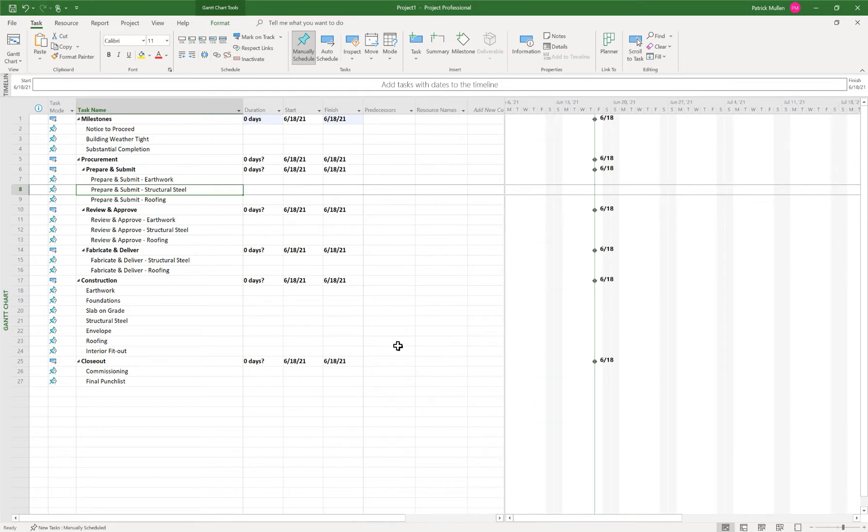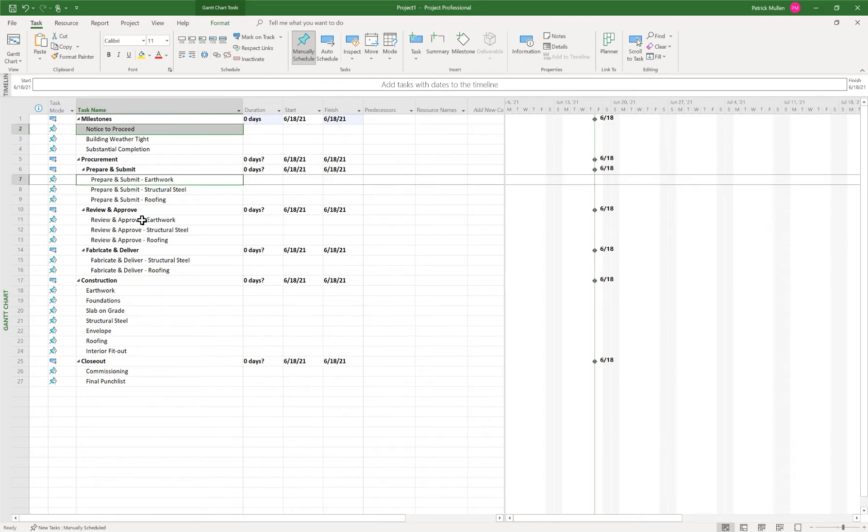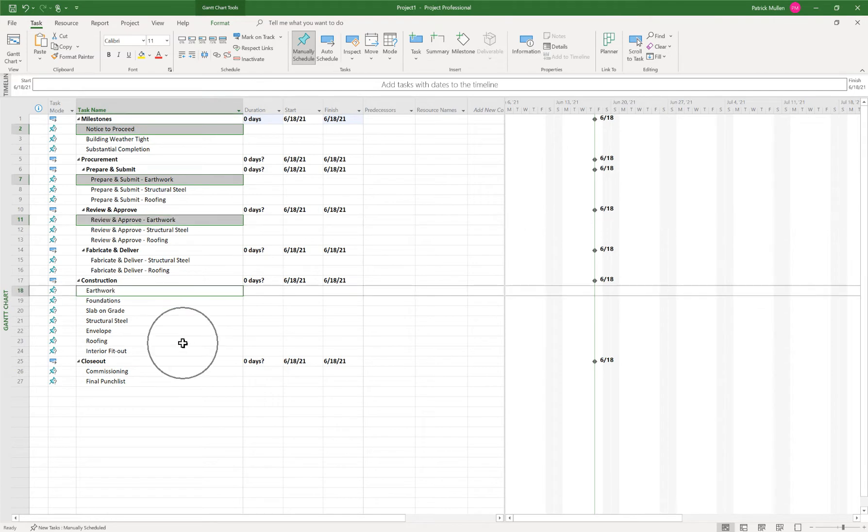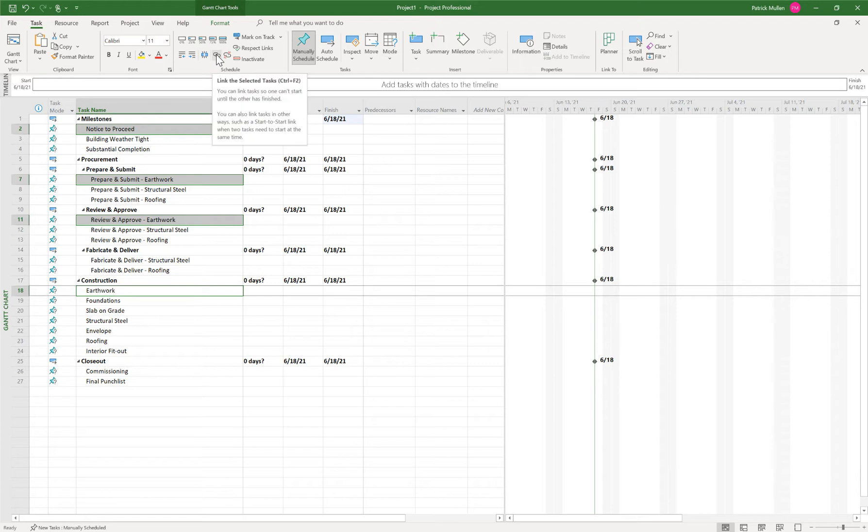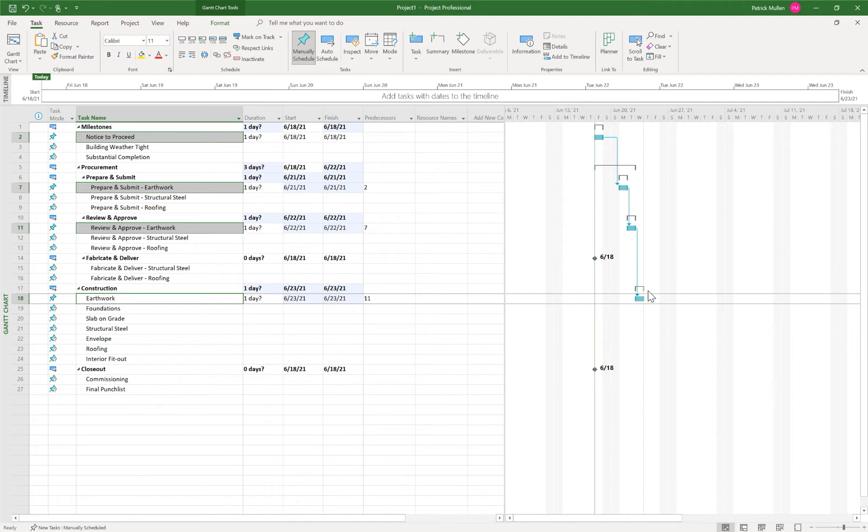And maybe the next thing that we can do is start adding relationships. So one of the things that I like to do is I'll click on the first activity in the sequence that I want. And then I click in the order that I want those activities to be linked together, holding the control key on my keyboard. And then I can just click here, link the selected activities. And you'll notice all of those get linked together.